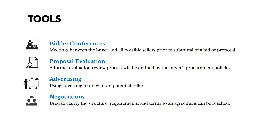Now let's talk about Conducting Procurements — selecting a seller and awarding a contract. Tools include bidder conferences, where you meet with all possible sellers, give them feedback on the work needed, and they can ask questions to make sure everyone understands what's required. You use proposal evaluation as a formal way of evaluating different contract proposals from sellers. You could also use advertising to attract more potential sellers. And negotiations are used to clarify the structure, requirements, and terms so that an agreement can be reached with a potential seller.